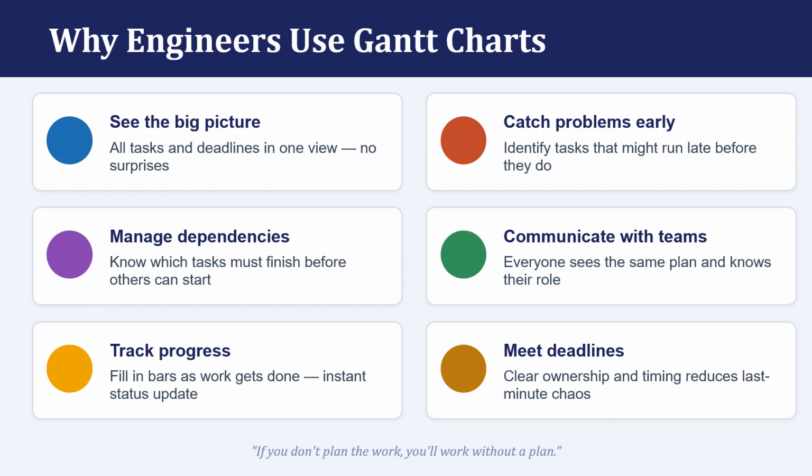Managing dependency. So you've got to know which tasks must finish before the others can start. If you jump into the build phase, you just start tinkering and building, and you don't do the correct things with the research and defining your problem and figuring out your criteria and constraints, you won't get anything done.